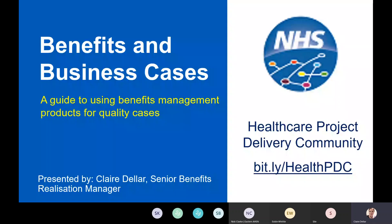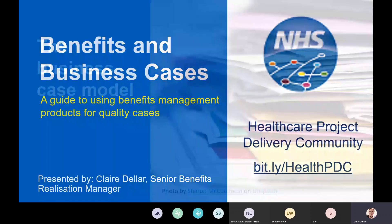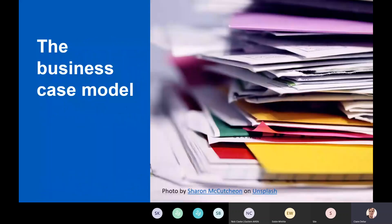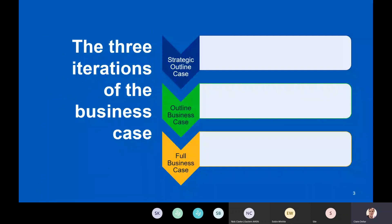We'll start with an overview of what the business case model is. The Treasury sets up three stages of a business case — three iterations. They're not completely new documents each time; each version builds on the previous. They start with the strategic outline case, the purpose of which is to determine whether what you're investigating is a problem, need, or opportunity that the organisation really needs to fix.